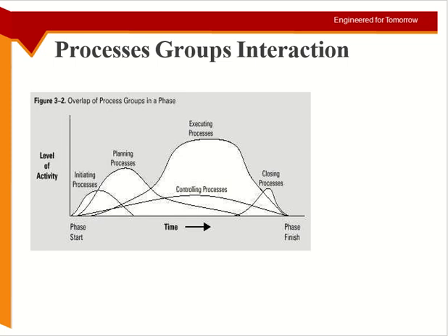where you just close down everything: the payments, the documentation, and these things. Another thing you can see is that the activities are overlapping. It's not one, then the other, then the other. It's not like this. Even between the initiation, the planning, and the execution, they are slightly overlapping, because you have to start something with the execution: the land, the cleaning of the land, the testing of the soil. Until you do that, your planning and initiation cannot happen.